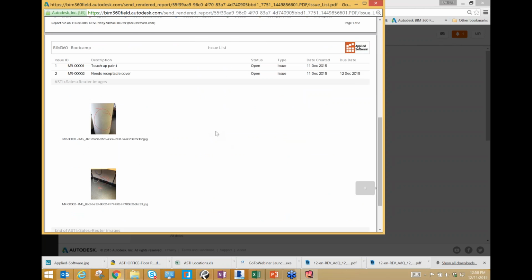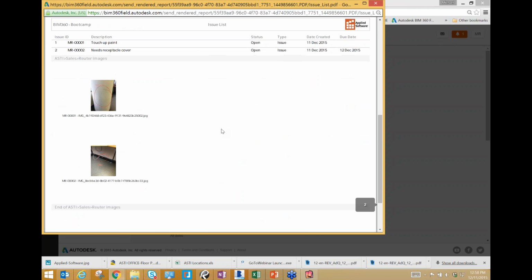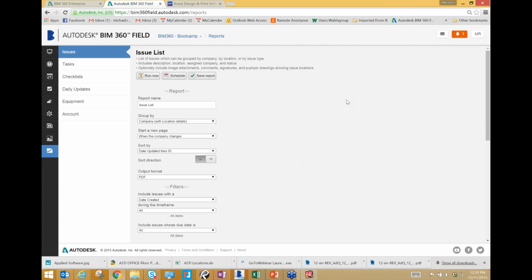Every time that I went out into the field, this is the exact report that I ran, and then I would hand it out to my superintendents and my subcontractors at our weekly quality control meetings. They had a list to work off of, and they knew exactly where everything was and what they needed to do. So anyway, that's my presentation. I'll open it up to questions for everybody.